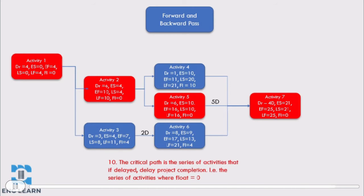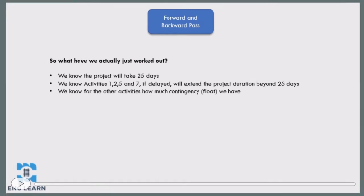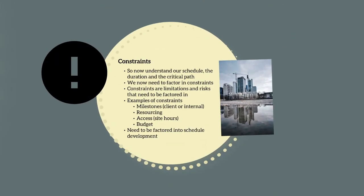So what have we actually worked out from this analysis? We know this project will take 25 days to complete. We know that activities 1, 2, 5 and 7 are the critical path, and that if these activities are delayed then the project duration will be longer than 25 days. We also know for the other activities how much contingency we have. After our forward and backward pass we have a really good understanding of our project schedule, the duration and the critical path.